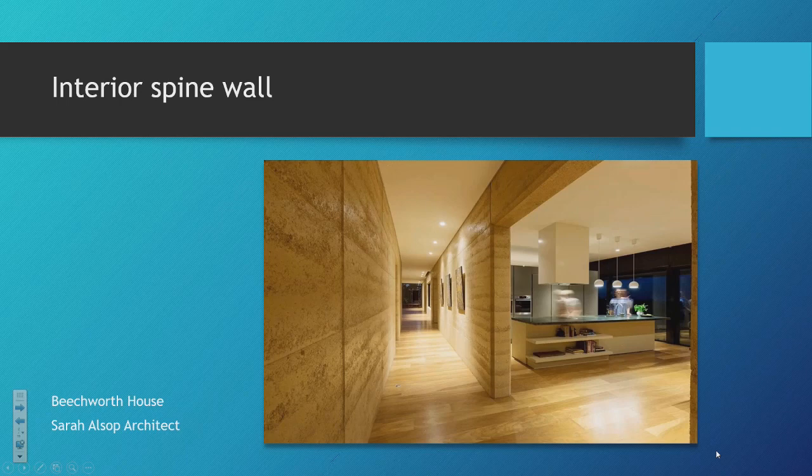Someone had a really good idea. I think it might have been Marcy. That we'd put a row of bricks. Have you seen those fired bricks that go around the perimeter of the top of the ground floor walls? Use those as a sacrificial form and then cast the slab up to that. So there's our 300mm walls, there's the little bricklet, and the concrete sat on top of our wall here, but the top of the slab was flush with the top of the bricks. It was all screeded off beautifully, really good concrete company.